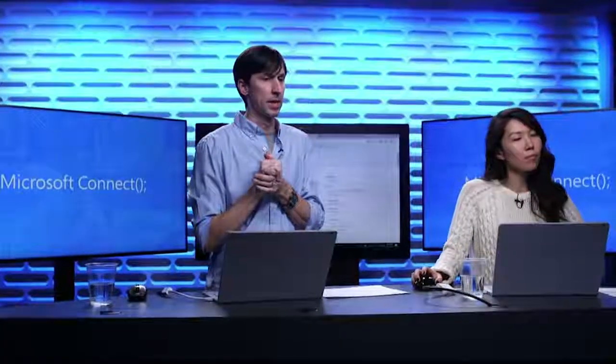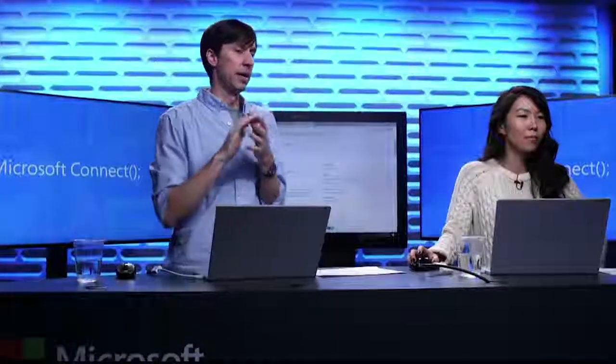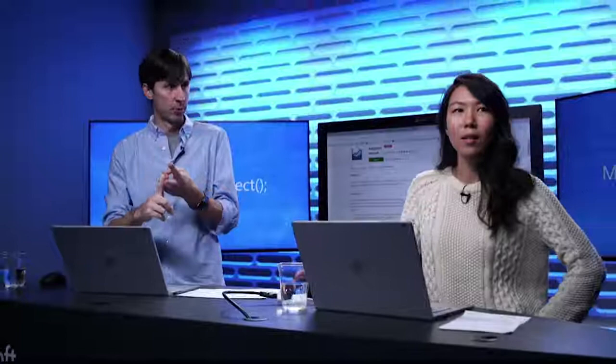Let's see, I'm looking at some of the other questions. Can three different project types be in the same project? What we mean by this, Salam, is that we've got one process that we're following here, but we're actually seeing three different teams follow different methodologies. So they're all using the same work item types. It's just that one is following a Kanban approach, one is following a Scrum approach, and then we had two different sprint cadences. We had a team that was following a two-week cadence and a team that was following a one-week cadence. So there's lots of flexibility.